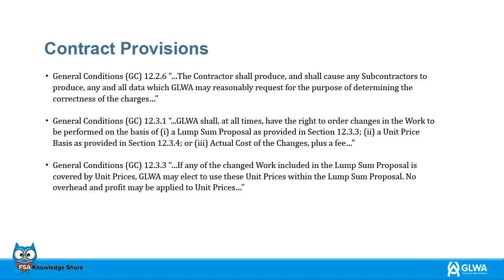General Conditions 12.3.3. If any of the changed work included in the lump sum proposal is covered by unit prices, GLWA may elect to use these unit prices within the lump sum proposal. No overhead and profit may be applied to unit prices.